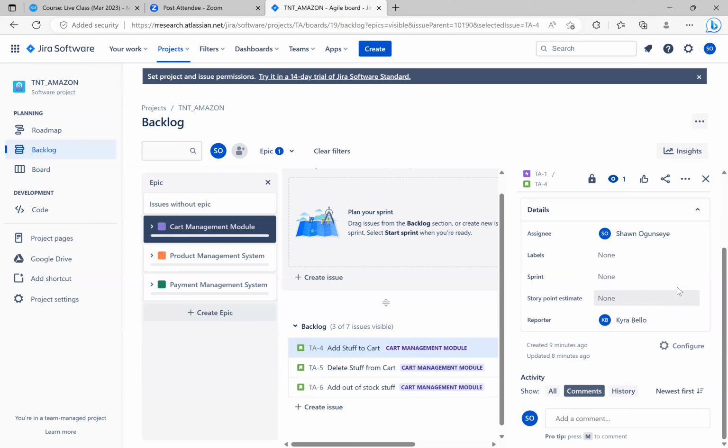Right. So you can know how many stories you can do in your sprint. Now, like I mentioned to you, for story points, some organizations use t-shirt sizes, so small, medium, large, extra large, extra extra large, all those kinds of things. Some organizations use the Fibonacci sequence, where 1, 2, 3, 5, 7, and so on. And they cap it at a certain number, where the highest number will mean that story is the most complex it can be, and then the lowest would mean not complex at all, right?